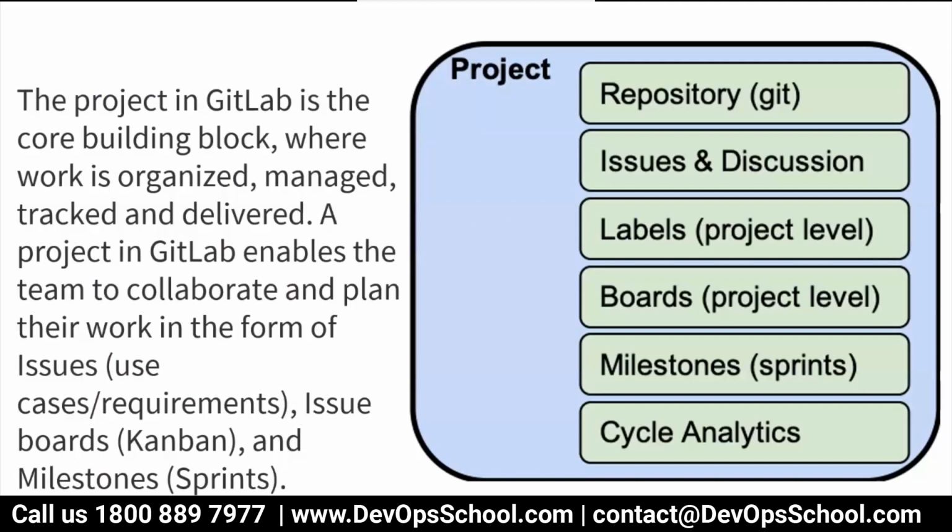Can we customize it, right? Jira inputs to this one, that's called integration. That can be very well done. Sprint one we call a milestone in GitLab. In Jira we call it sprint only, but here we call it milestone. So you can run your own sprint process using GitLab itself. No need to have Jira. You can have your stories here. Stories will become issues. Sprints will become milestones. For sprint 110, that would be a milestone. And for team meetings, we have a board also.